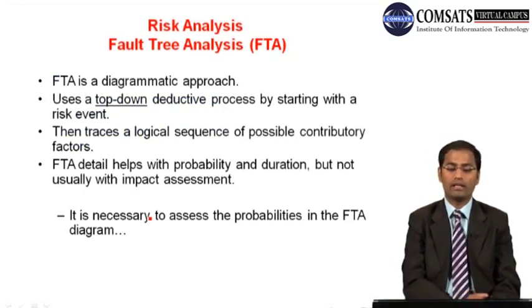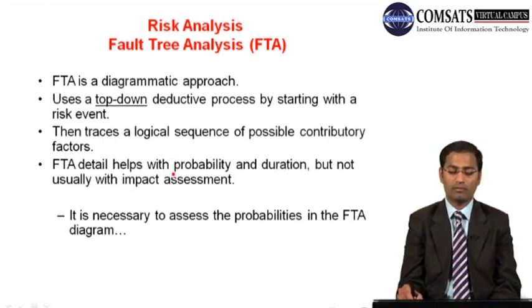Fault tree analysis is a diagramming approach. It uses a top-down deductive process by starting with a risk event, then traces a logical sequence of possible contributory factors. FTA detail helps with probability and duration, but not usually with impact assessment. So that is a very, very important thing.